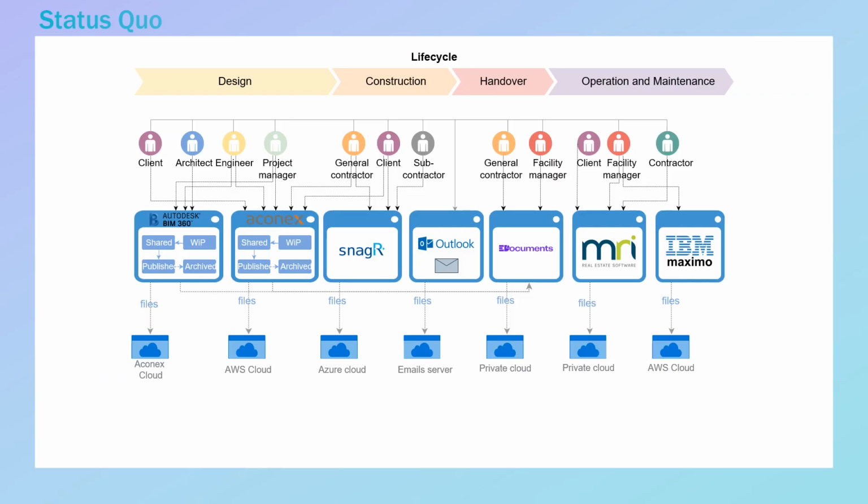After talking with industry experts, I found out that the idea of CDE as a single source of truth for all project information is rarely implemented in practice, as more commonly there are multiple CDE tools used simultaneously in each of the lifecycle phases. So, for example, during the design phase, tools like BIM 360, BIM Collab, Aconex, or Viewpoint for Projects are used, as well as simple cloud-based storages like Dropbox or Google Drive.